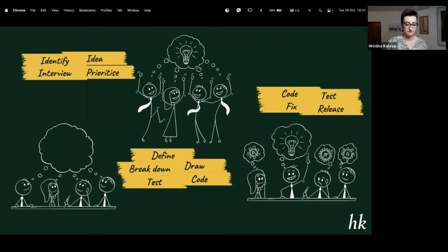So first, agree on priorities, and priorities should not depend on the complexity of the solution. They should not depend on the expected quality. The priorities are a business need, and they should be defined by the business, consulting the engineers. These priorities should not depend on whether it's something huge. If it's crucial for our business, we go for it and do it. We don't take it back, because our business will suffer.